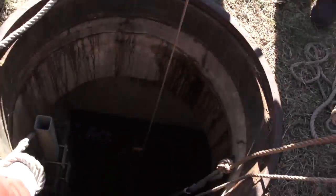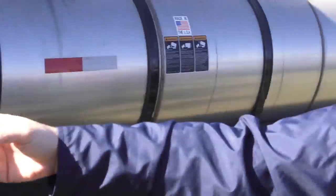He checks the air to make sure that it's all evacuated. It's a confined space entry, so we have to do a confined space entry log. The guy's on a tether, so if for whatever reason he feels faint, we can crank him out. Ready. Okay. So now we're going to turn on the vacuum truck, and they're going to start removing some material.